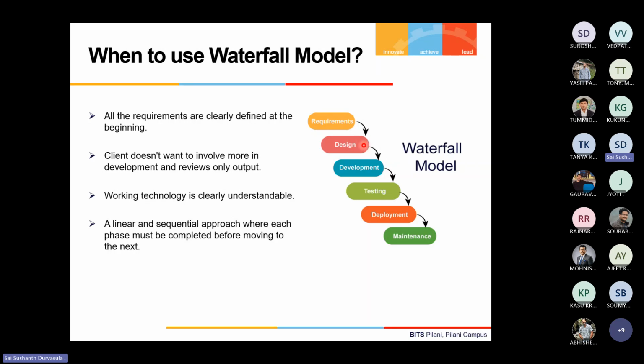Else, if it was a design bug, you start pouring water from here. And if it were a development bug, like the software one we discussed, you start pouring it from here. So the location at which you restart this cycle may differ based on the type of bug, but the key highlight here is that it's all sequential: one thing happens, and only then the second thing starts. That's what we are trying to highlight in this diagram. But yes, you're right that based on the type of bug, you restart at that particular step. Yeah, thank you.